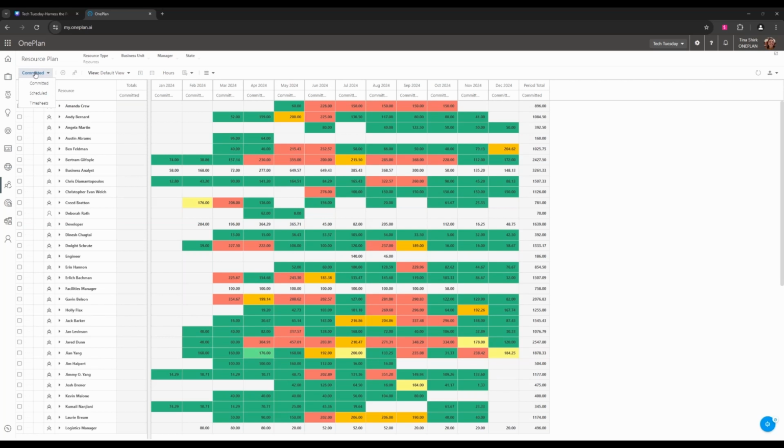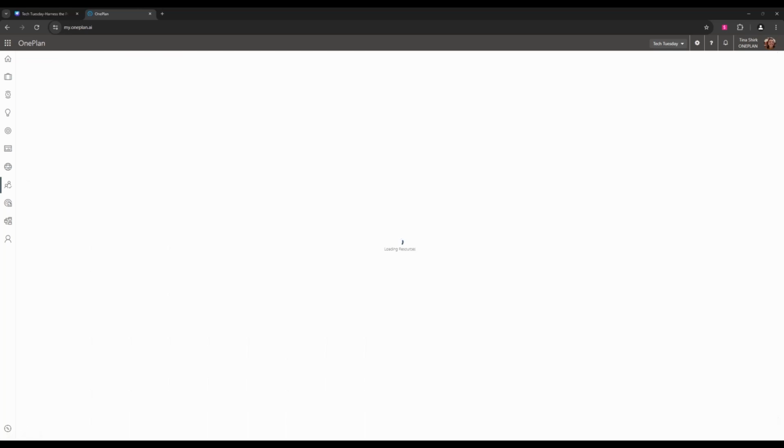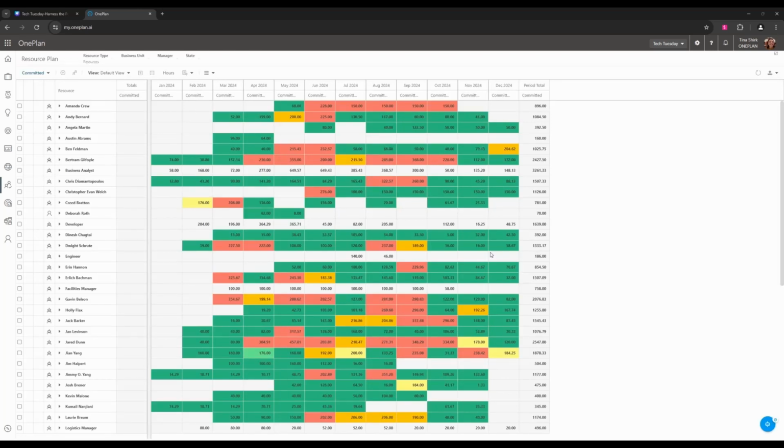There are possible and often likely differences between how a resource's time is first planned, booked into specific work, and then spent. You can see here, there's a couple different out-of-the-box resource plan or cost types that we have in our resource plans. We have our committed cost type, which we were in initially. This is the initial estimate at a high level of how your resources are being allocated to their different tasks and plans and things like that. So this is where you'll do your top-down planning, right? That high-level initial stab at allocating your resources.